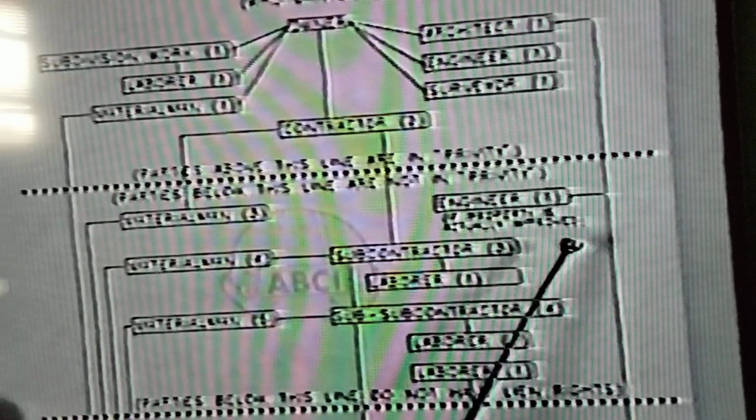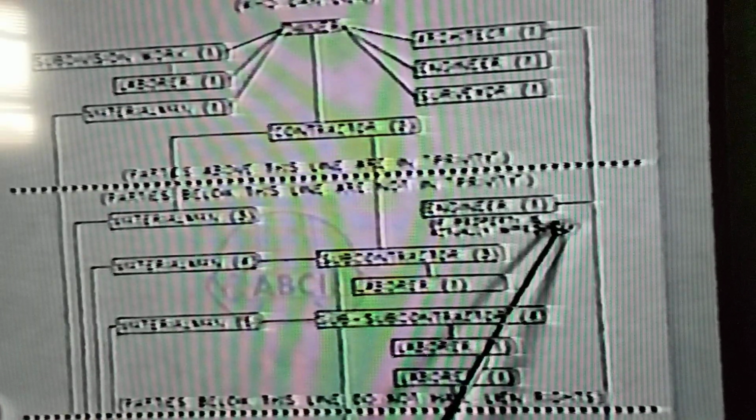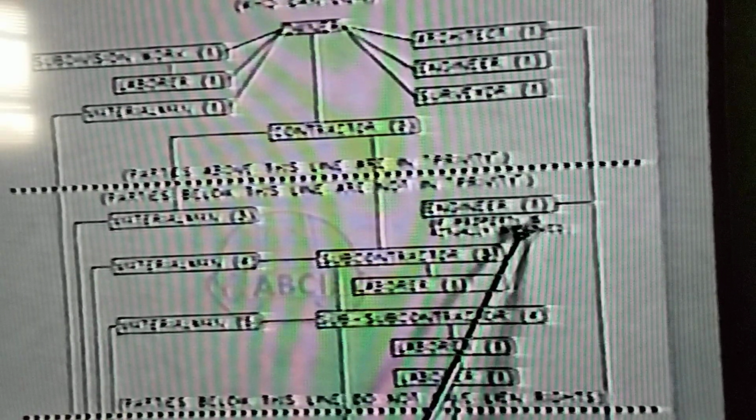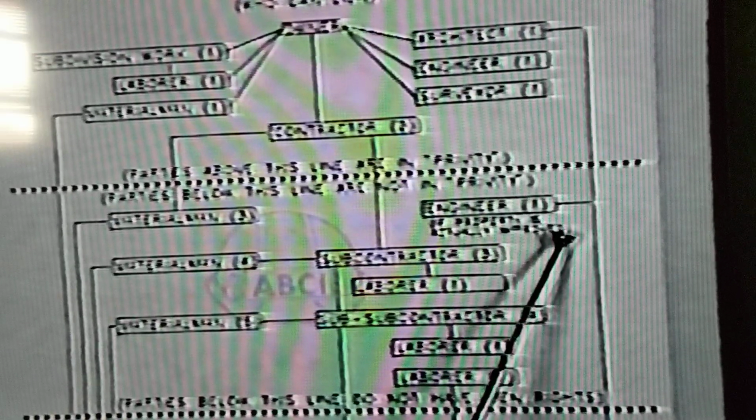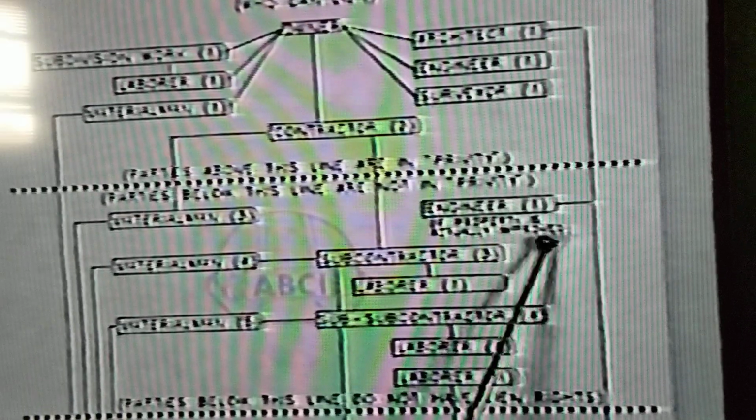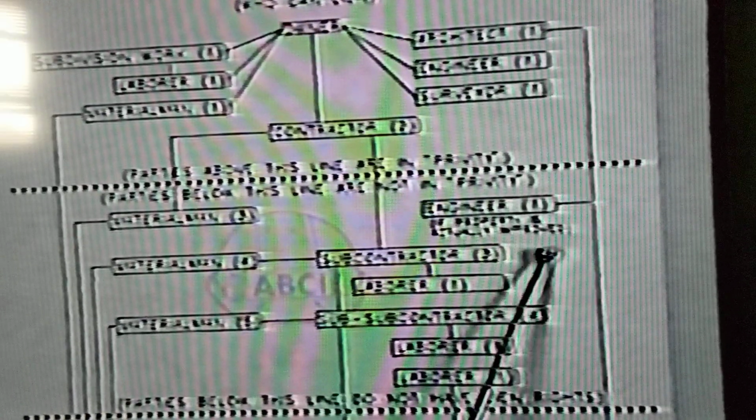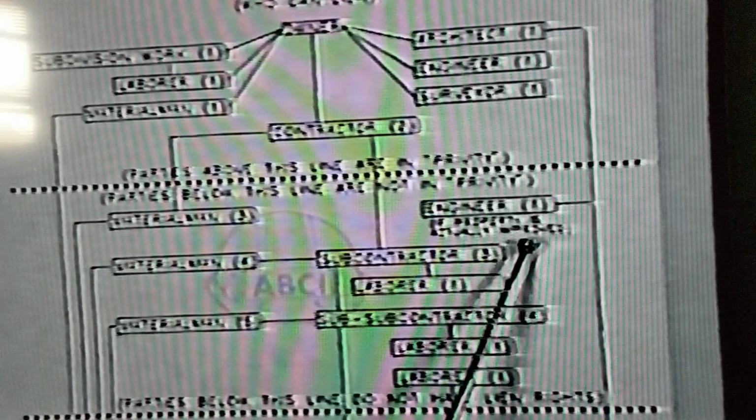Another feature here, if we take this situation a different way, is here we have the architect who has now hired an engineer. Okay? And this engineer, who has been hired by the architect, by this line, is he shown in privity or not in privity? Not in privity. Which means that this engineer would not be able to file a lien if the property was not actually improved. But if the property is improved, and if the engineer follows the correct protocol for filing the notice to owner, then this engineer would have a claim of lien.